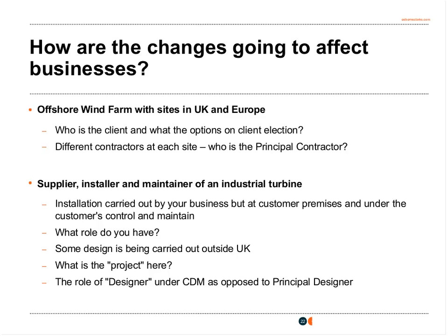What it does mean is that your business is going to have a duty to ensure that you've got the necessary skills and competencies to fulfill the role, which is doubtless going to be the case here as designer. And you are going to have a duty to cooperate with others, and provide information to both the client and any principal designer that they have appointed.